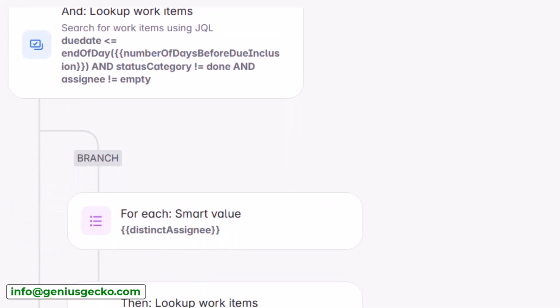You can, for example, configure your PPM system or a workflow automation so that when a project status changes to initiation, it automatically sends a pre-formatted email to a predefined stakeholder group with the link to the meeting invite and related materials.